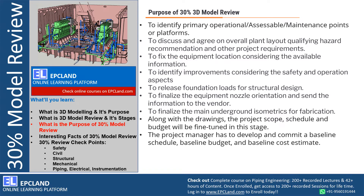To fix the equipment location considering the available information — we don't have final information, so whatever is available, based on that the equipment locations are fixed, and accessibility, operational and maintenance accesses are planned and reviewed. To identify improvements considering the safety and operational aspects — when sitting with all stakeholders from safety, operational maintenance, installation, and erection teams, they will identify improvements. To release foundation loads for structural design — this can only be done if locations are finalized. We can then calculate how much foundation, concrete, and steel will be required, and estimate foundation loads to help with cost estimation and further design activities.